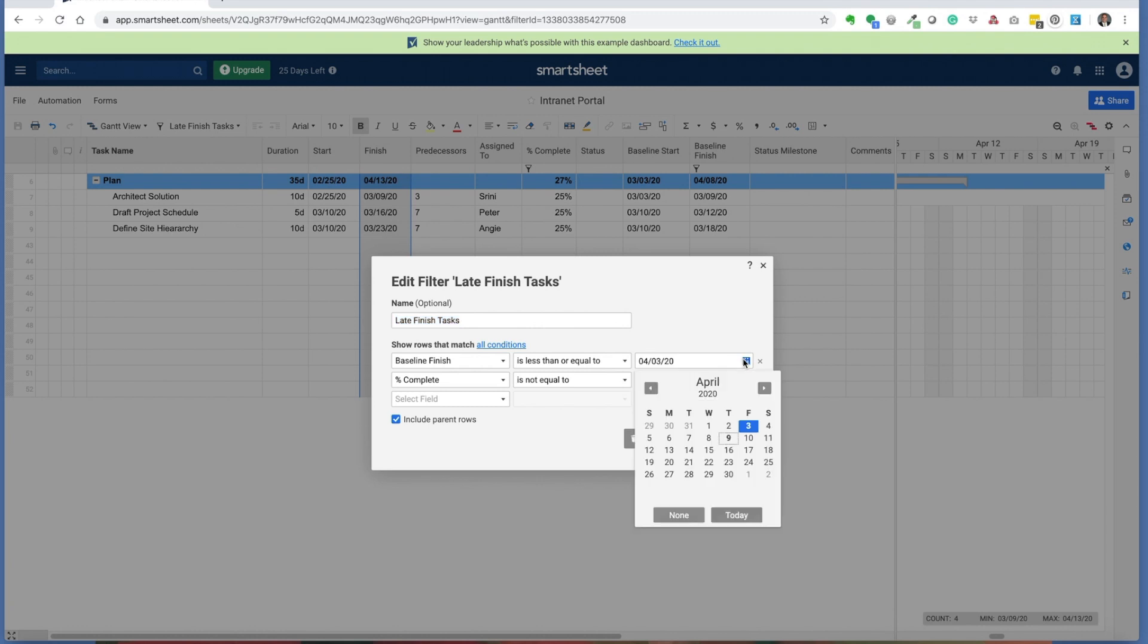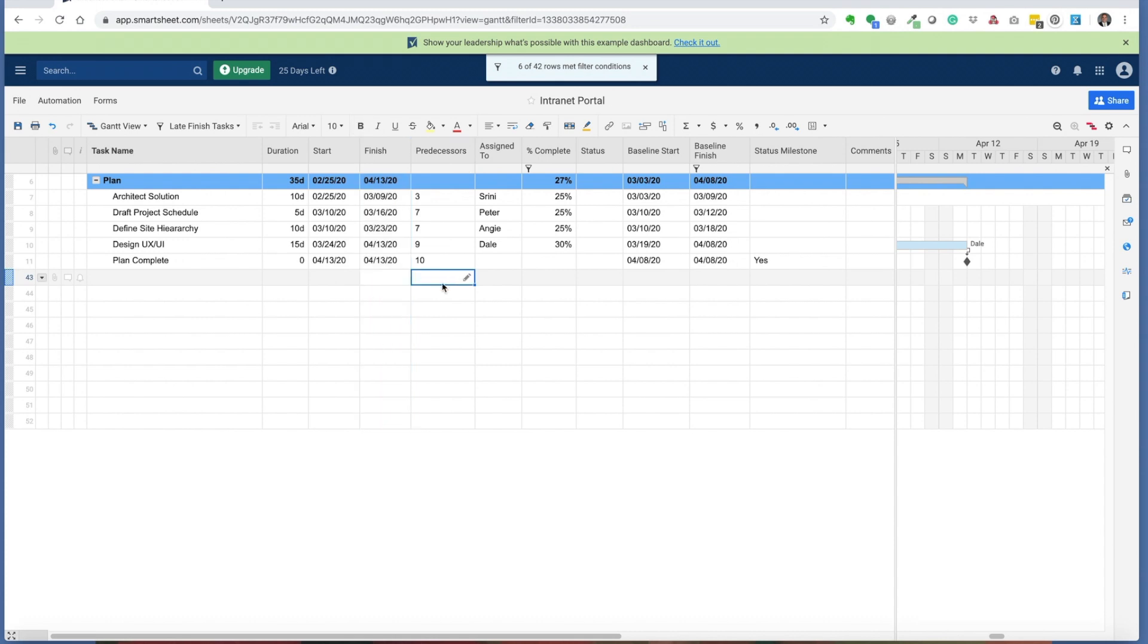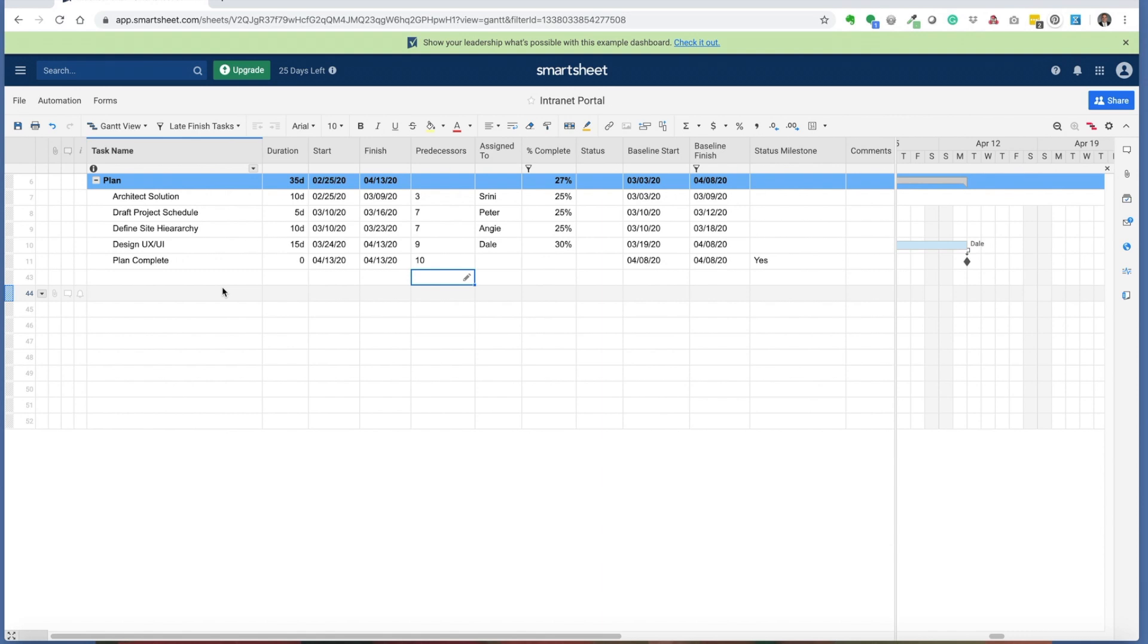I can change that date if I move it ahead a little bit. Now you'll see there's additional tasks that are running behind. I use this filter to help identify what are all the tasks that are running late, and how should I be following up with my team to understand where they are and how they're going to be forecasting against new dates.